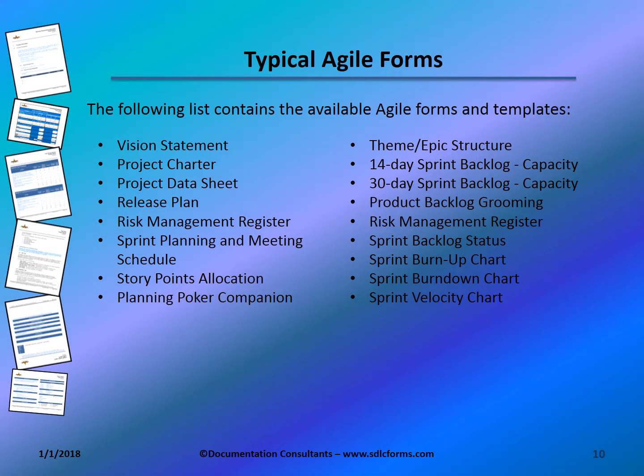The forms shown represent our entire Agile Forms inventory. Many organizations create their own versions of user stories and other minimal documentation. Progress is monitored via sprint backlog, status and grooming reports, and burn up, burn down, and velocity charts.